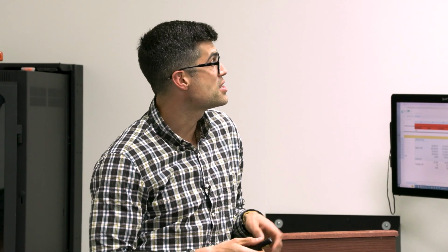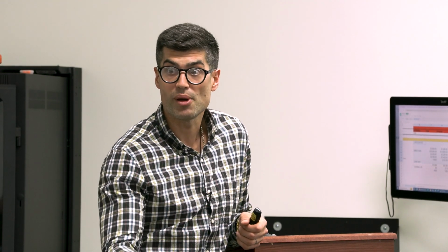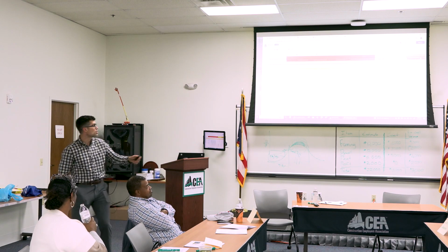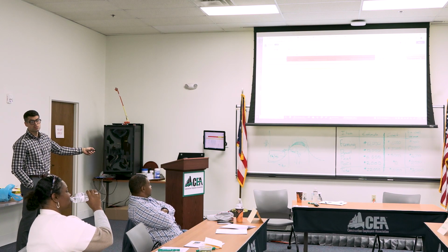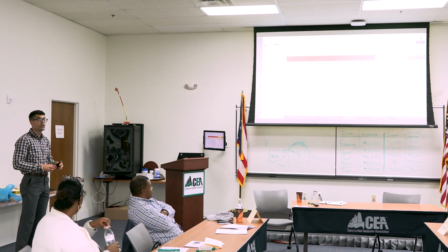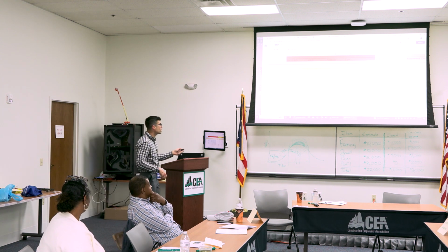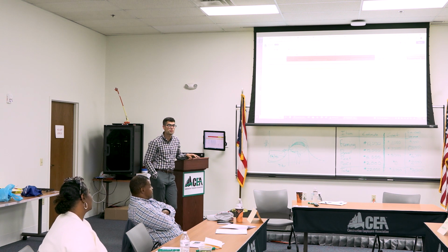Now here's the next level too, is we're flushing out the feasibility study. I will tell them and show them, you want to now spend money in certain areas. For example, I would probably choose higher end things in the higher end spaces that you care about. And you can color code and pick and choose, where do I want higher quality? Where do I want less? At least it gives your client a chance to make those decisions, to allocate, let's spend high over here, low over here. And I think what this does, if I presented this to a client, and I have before, they love that you're looking forward, that you're trying to mitigate their risk by providing them options and ranges.